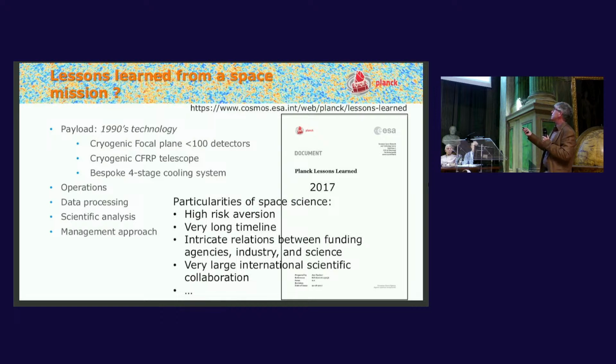And then we have this complicated 4-stage cooling system. I think, to be honest, each one of the elements of that cooling system was a kind of prototype. They had never flown in space, if not the first time they were built, maybe the second, and so on. So they were really working models, if you like. And that was part of the risk assessment that Reno pointed out. Planck was a very risky mission, largely because of these coolers. They worked though, so that was great. On the other hand, are you going to use something like that again? I don't know. You know?